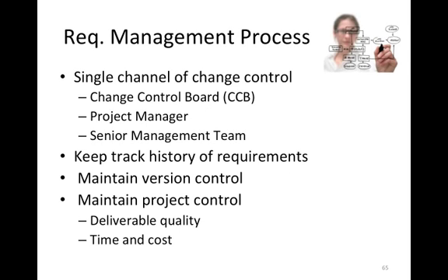Requirements management generally means that there needs to be a single channel of change control. There needs to be a single group of people who work together, a committee or a group that makes a decision whether a change should be implemented or not.